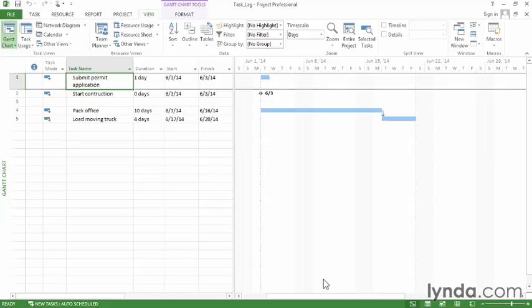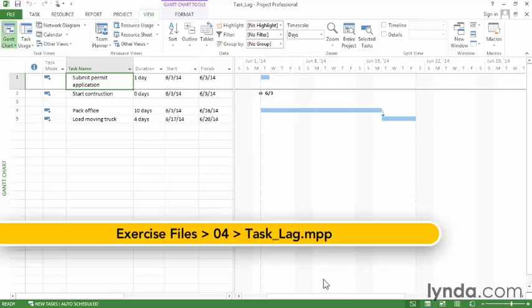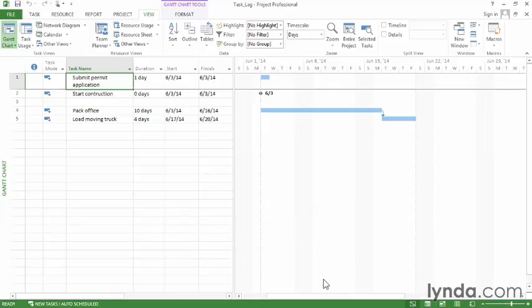Sometimes linked tasks have delays or overlaps between them. Delays are common in start-to-start tasks, when the predecessor gets started, and then, a little while later, the other task starts. You can tell a project about delays or overlaps by filling in a task length's lag field.